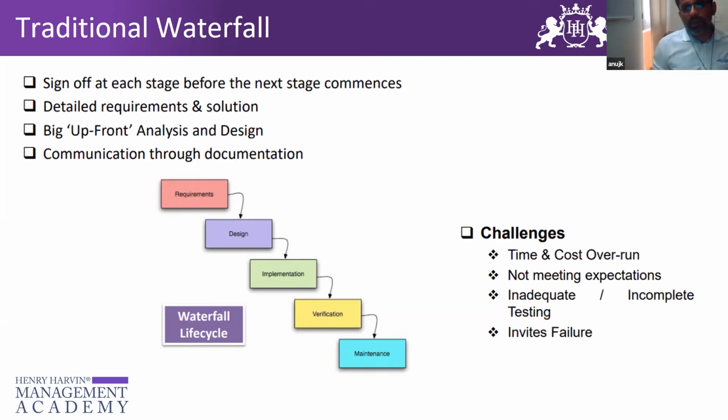Here, what happens in Agile is that you build, verify, design, build, verify, test, all in the same 15 days. It's not that I build today and test it after 6 months. What used to happen is that I have a design, and we had a phase where 30 days or 90 days was for development and another 90 days for testing. See that gap where for 90 days the tester is not doing anything, and after 90 days the developer is not doing anything. Now this whole process is embedded into those 10 or 15 days, where we pass it along in the same way, but faster, at a greater pace, and with early adoption.